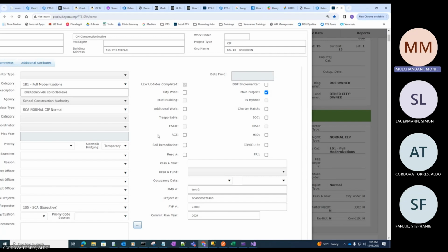So as soon as he does that, internally, when it saves, the status gets changed to PCPS ready to forward, which means they've done their updates to the LLW. It's completed. So the project controls pre-scope complete date is populated, the end date that it's done, and it's ready to forward. Now, at times it's ready to forward status, at times it goes to the next activity. This happens when, in this case, project controls is a department, basically ODC, and they are done with their work. So now it's going to get handed over to another department.